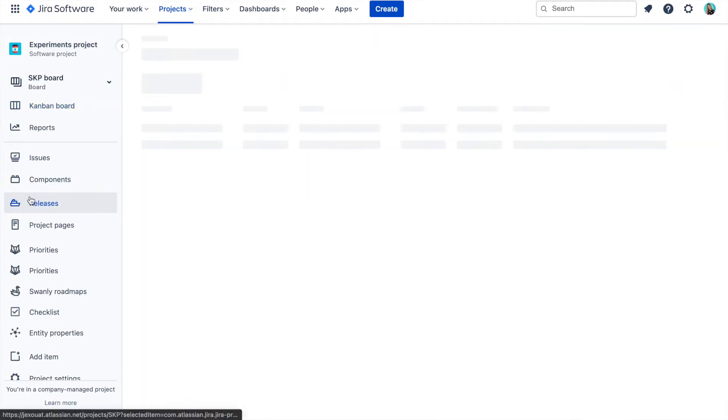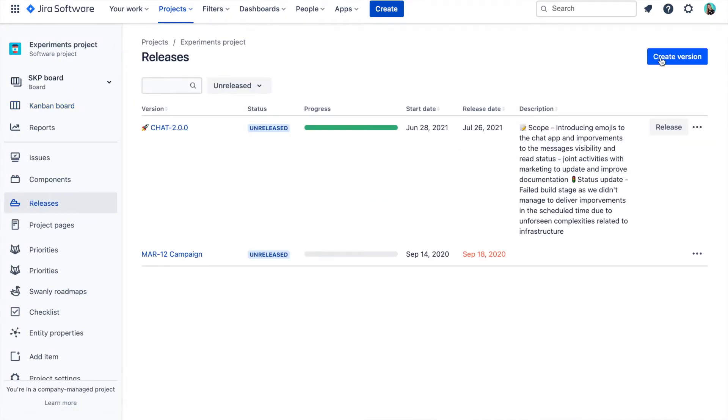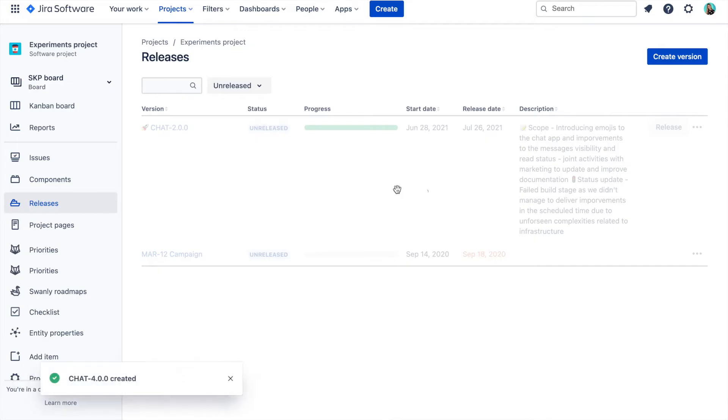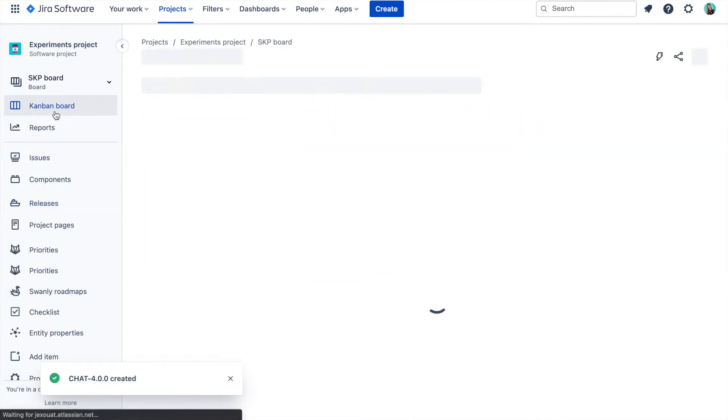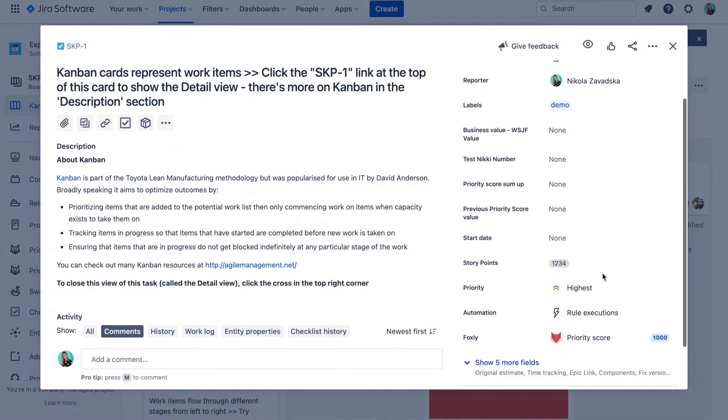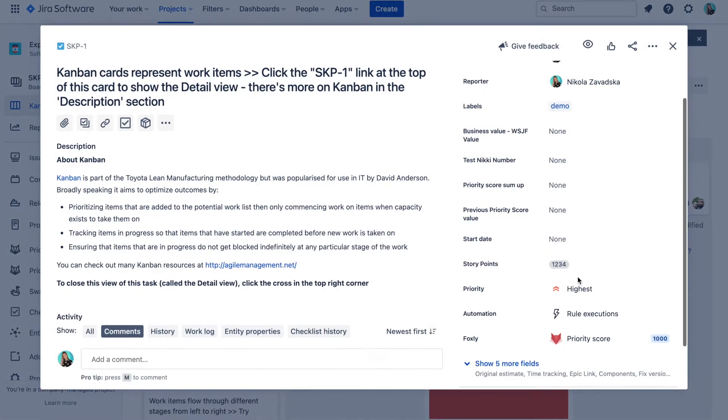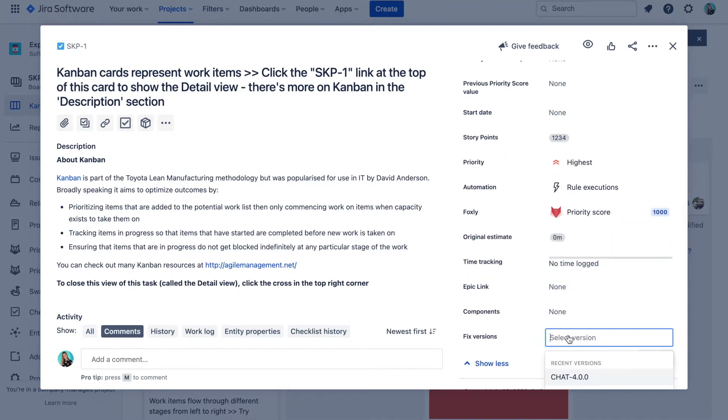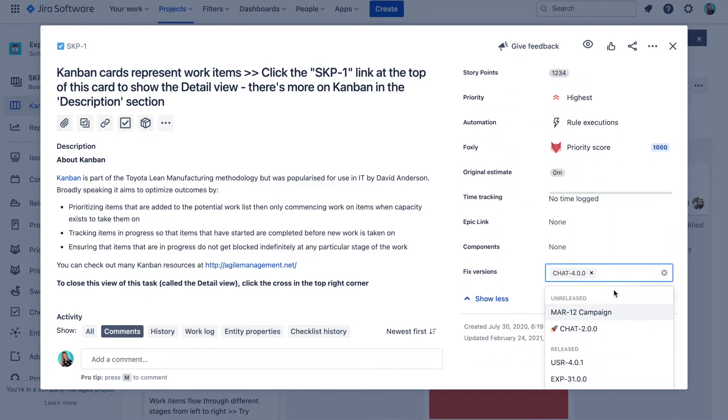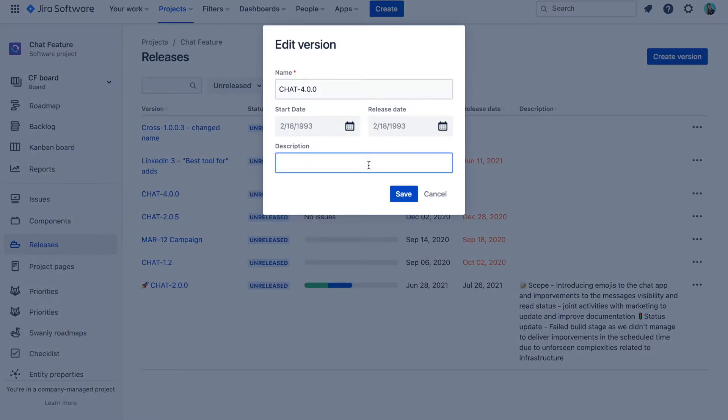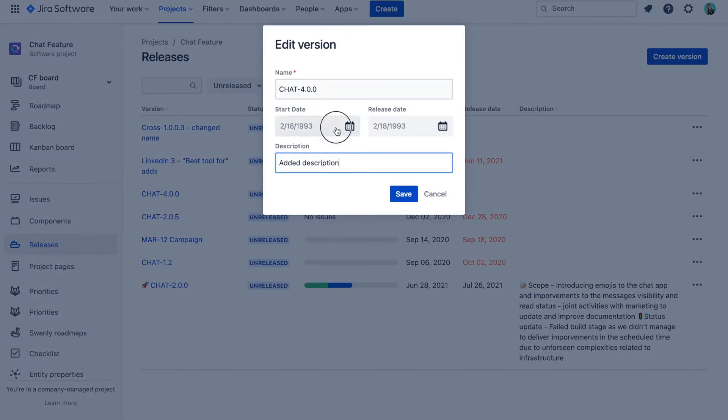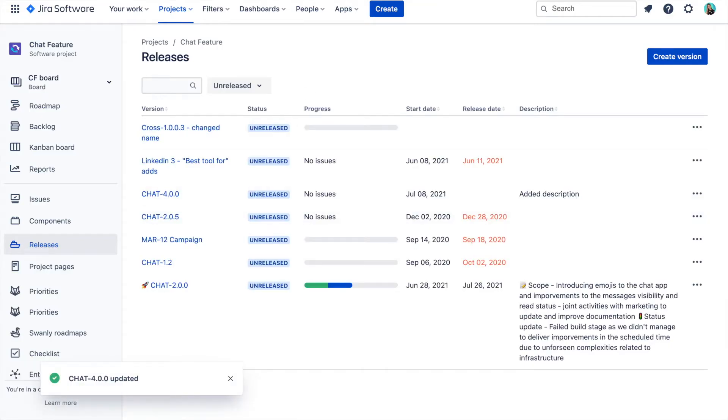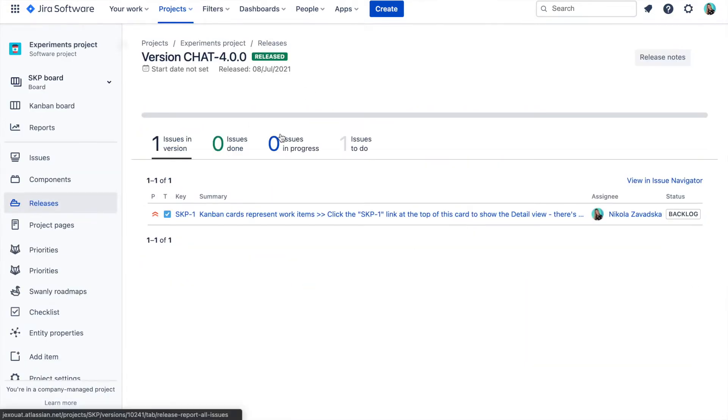What some decide to do is to create a version in each of these projects that has the same name. This then enables you to link issues to the same version name, search your Jira issues and run reports. The tricky part is to keep these versions synchronized. The name, description, release date or even status can change in one of the projects and that might cause inconsistencies.